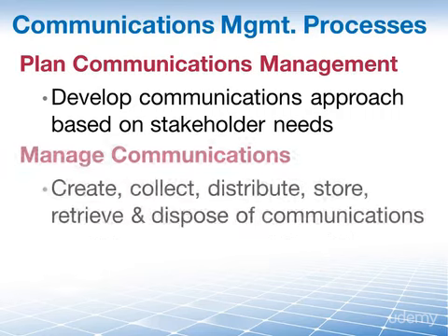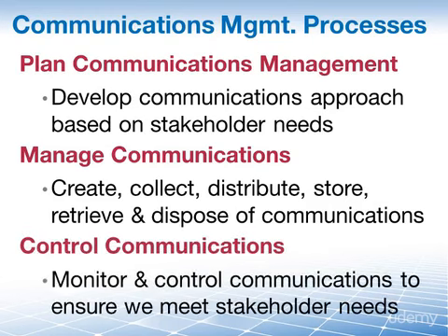From here we move on to manage communications. This is the process of creating, collecting, distributing, storing, retrieving, and the ultimate disposition of project information in accordance with the communications management plan that we developed in the first process there. And lastly, control communications, the process of monitoring and controlling communications throughout the entire project lifecycle to ensure that the information needs of the project stakeholders are met.